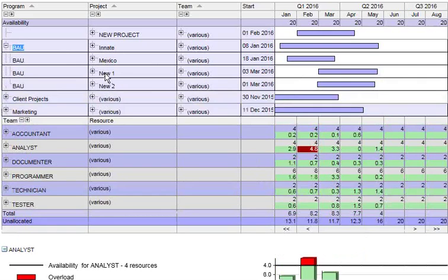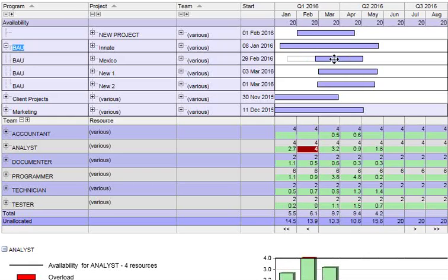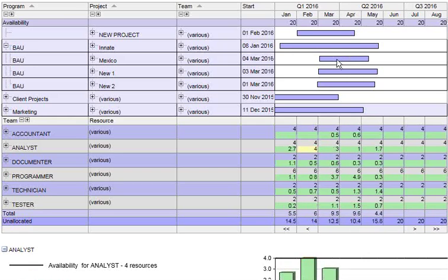see there are a number of projects there, all of which represent committed work. And if I'm going to start moving this around in time, I may well want to just abandon what I'm doing if I don't like it. So let's pick up Project Mexico. Let's assume that's a fairly low priority project, and we can now see by how much we need to delay that. So we pick that up and drag that out. We can see that if we take that out towards the end of February, then we get a pattern that's acceptable.